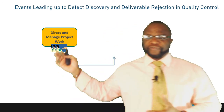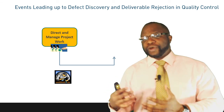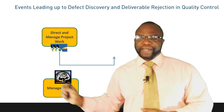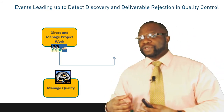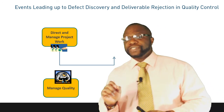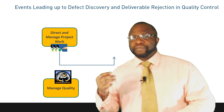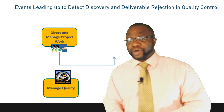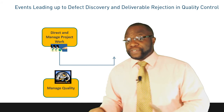We see an arrow coming from Direct and Manage Project Work, representing the flow of deliverables to another process. But take note of this next process: Manage Quality. Did you know that in Manage Quality, even before your deliverable is produced, you are checking not the product but the process? Manage Quality is code for quality assurance — that's where you check the process to ensure your processes are actually working, that people are following the process, and to identify if a process is broken somewhere down the line.